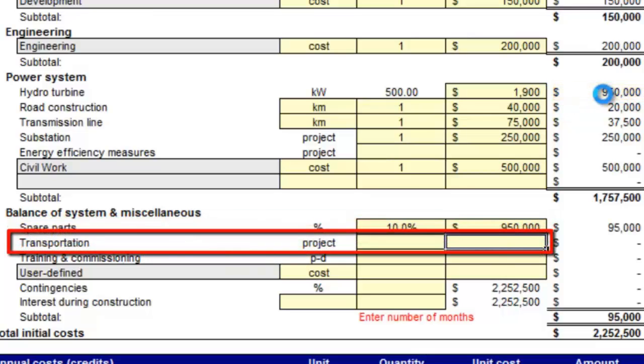Transportation costs for the equipment and construction material will vary widely depending upon the mode of transport available and the location of the project site. In many instances, the cost will depend on the transport distance and be based on a volume-weight formula. Costs to handle the material at the receiving end should also be considered.